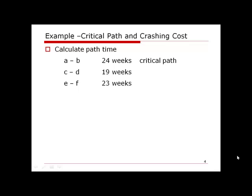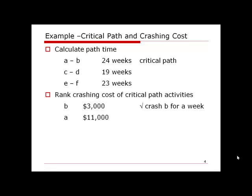We crash one time unit at a time, so we try to crash only one week. We rank the crashing costs of critical path activities: B costs $3,000 for the first week and A costs $11,000. We pick the lowest cost, which is activity B. We crash B for one week at a cost of $3,000 and save $12,000 in weekly project costs, netting $9,000 in savings.